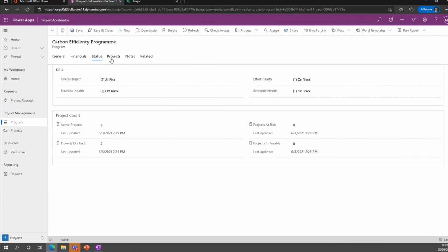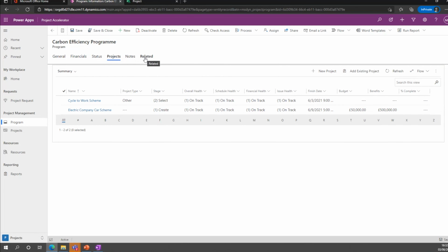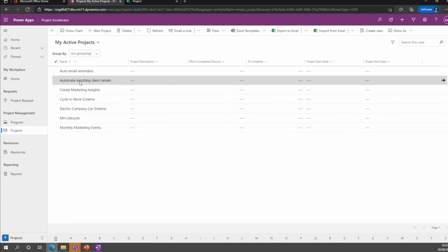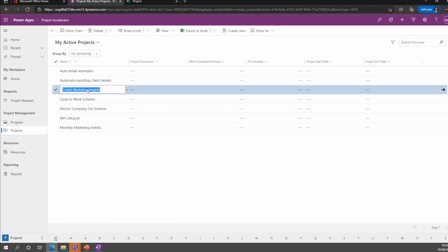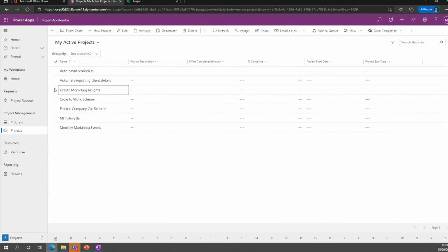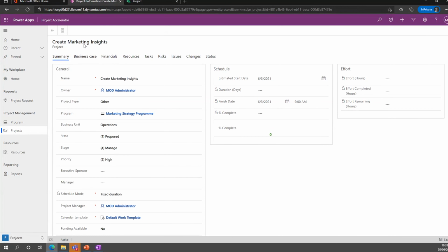Yeah, if you wanted documents, you could have a tab called Documents here, and it would show the SharePoint document library here as well. This is quite simplistic, as I probably keep mentioning too often, so apologies for that. But if you were in a project record, you could have a project going through a life cycle. We call it a business process flow or a project life cycle. So for example, discovery, alpha, beta, closure, and based on what stage it's at, we can dump template files into that document library.